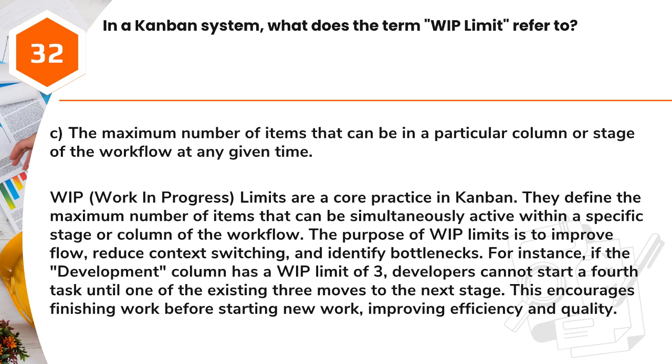For instance, if the development column has a WIP limit of 3, developers cannot start a fourth task until one of the existing 3 moves to the next stage. This encourages finishing work before starting new work, improving efficiency and quality.